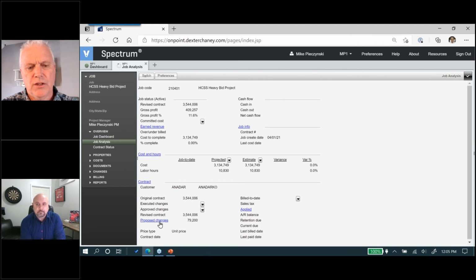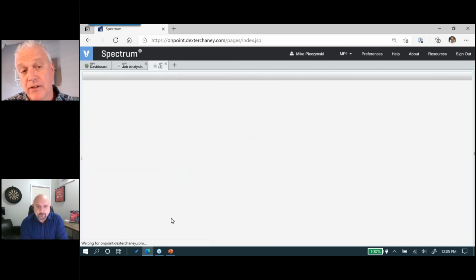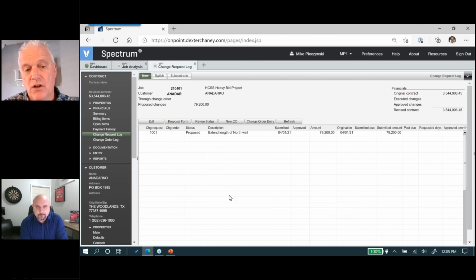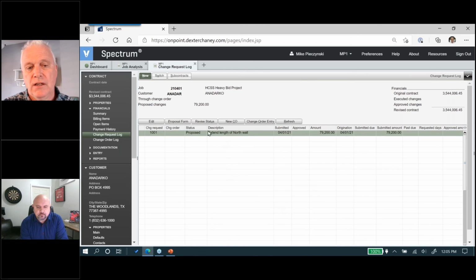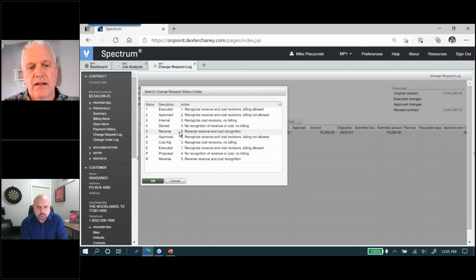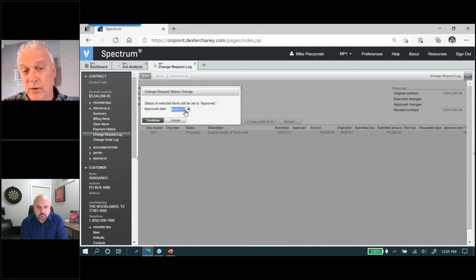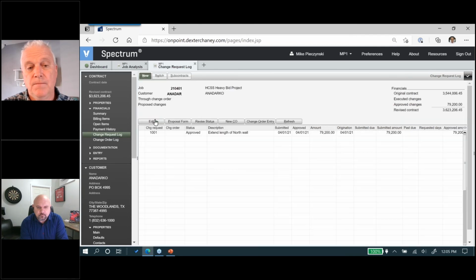All right. Now, just to take this to the next step, what a lot of folks will do to process this is they'll look at the log. I hit that hyperlink, and now I'm looking quickly at my change log. And if we get an approval to proceed on this, I can highlight that change and I can click on this revised status. Just do it that quickly. All right, and I'll hit approved here. Client has said proceed with the work. What date did they give us the approval? I hit continue and I will save and close.